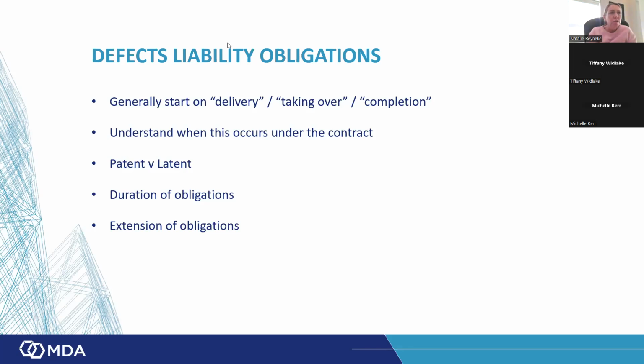I'm not sure what you mean. If there's no program of work, how would you map the critical path? So I don't think my initial answer is going to be no to that. And remember that if he fails to submit a program of works, how would he ever justify a claim in any event? Especially, for example, in your JBCC contract, your extension of time claims have to show the impacts to the critical path. I'm not sure if that answered your question, Earvault, but if you want to expand on that, you're welcome to do so, and I'll have a look a little bit later at the Q&A again.